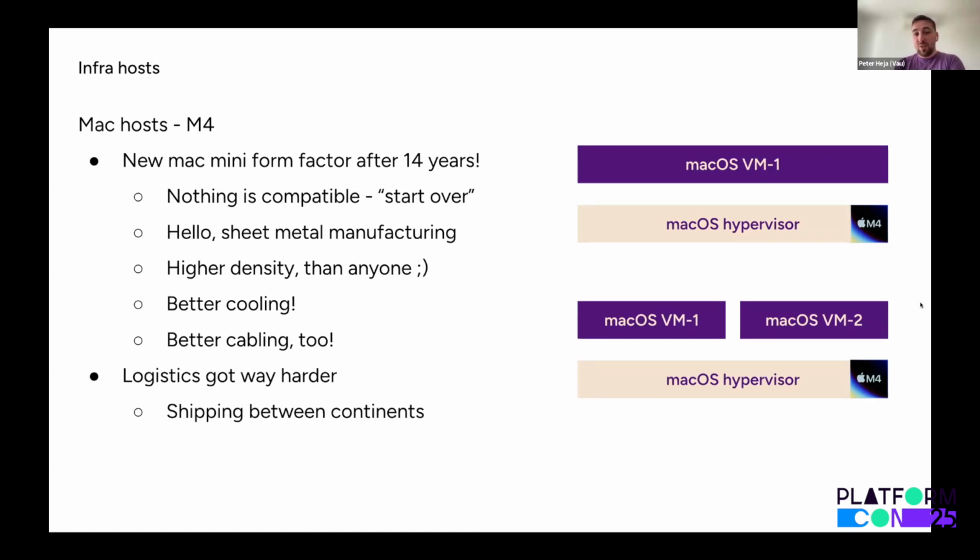But also we have to ship that solution because we manufactured in Europe. As anybody can tell, my English is not the generic American English. We manufactured things in Europe and we shipped it to the US. That's proven to be a very interesting problem that I have never faced. Shipping software is super easy, but shipping many units of rack mount hardware is not that simple. You will need a third party, that's for sure, or anybody will need a third party for that.